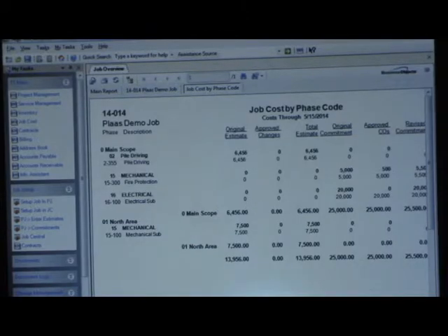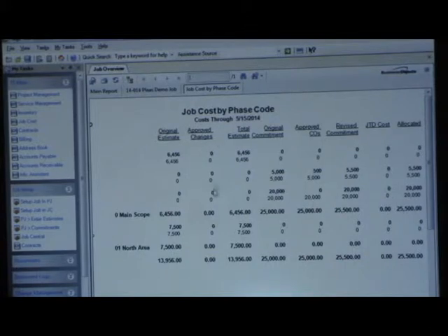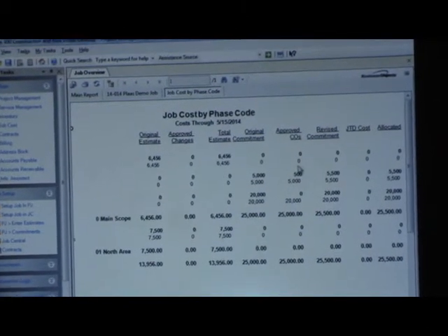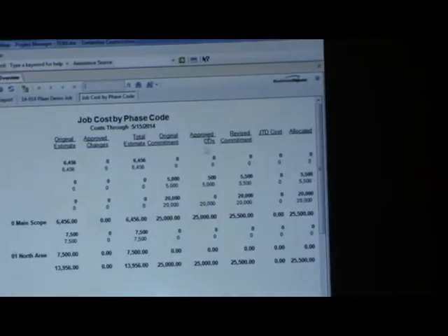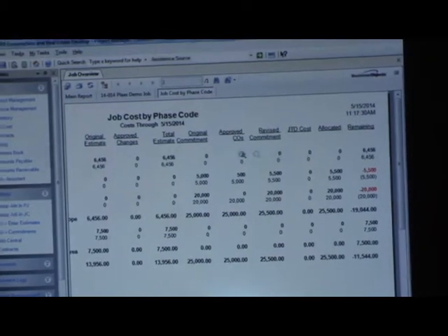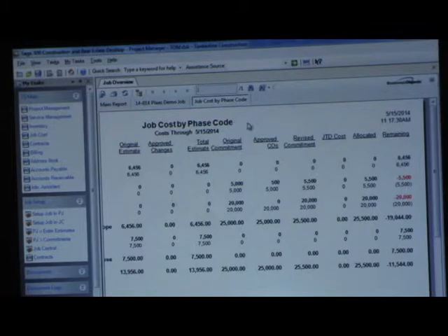So because the accounting dates are wrong, it's not going to reflect here. But the nice thing about that is our approved cost estimate will be here to update our new estimated cost. Our approved commitment change orders will be in here to show our updated commitment. And again, this report is only showing the cost side, not the revenue side, but our projected revenue is now also higher because the owner approved it.